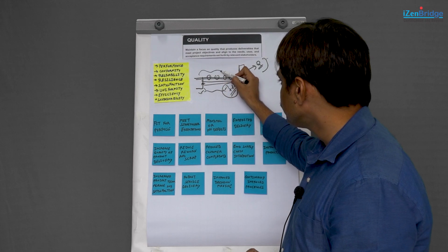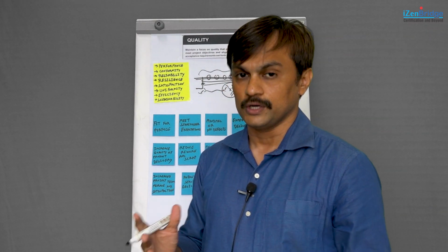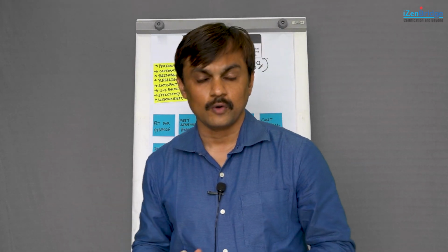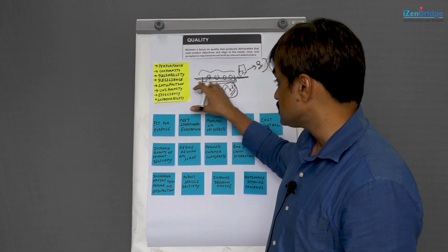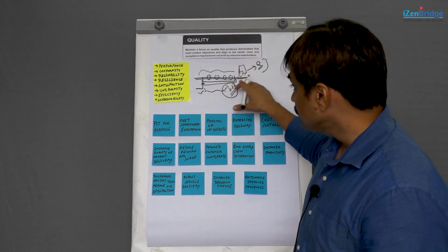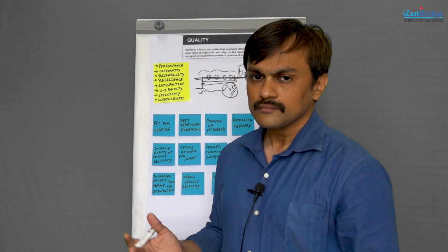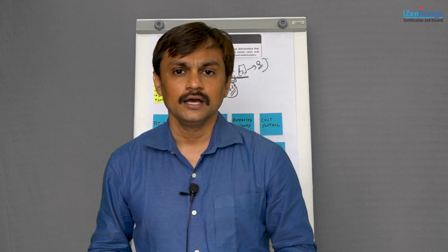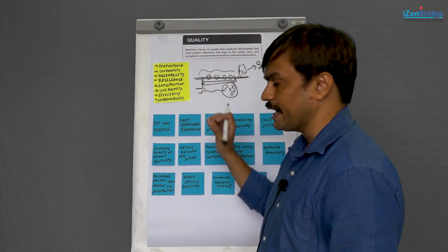Now, this portion of your review processes can be checked in a way if you want to do a verification of quality by way of audits and reviews. So, the process quality can be ensured with the help of reviews and audits, whereas deliverable quality is many times, once the deliverable is produced, also verified by using inspection and verification or testing which you do here. So, that is the whole idea.